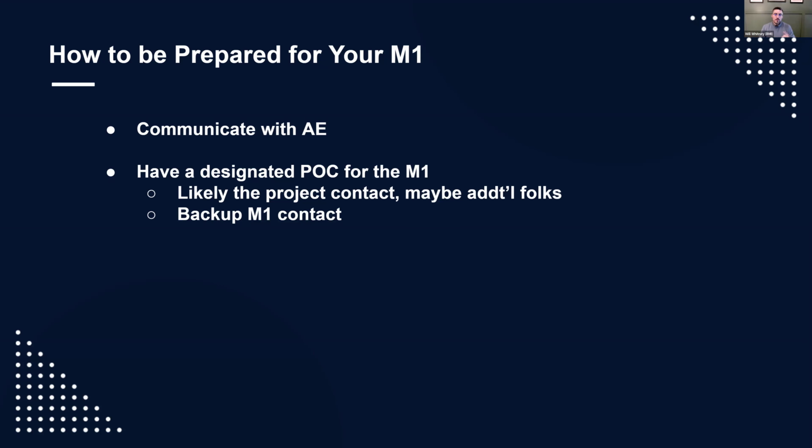So just be ready to get the M1 approved, or if you're going to be gone, tell your AE, hey, I'm going to be out for the next 2 weeks. I know this thing should be done soon. I CC'd this person over here that you can do it with. They'll approve this thing once it's ready. So it helps everyone, and it prevents things from sitting for weeks of, hey, it's ready, silence, silence, silence. 3 weeks later, okay, I looked at it, or I can't get into it, or whatever it is.